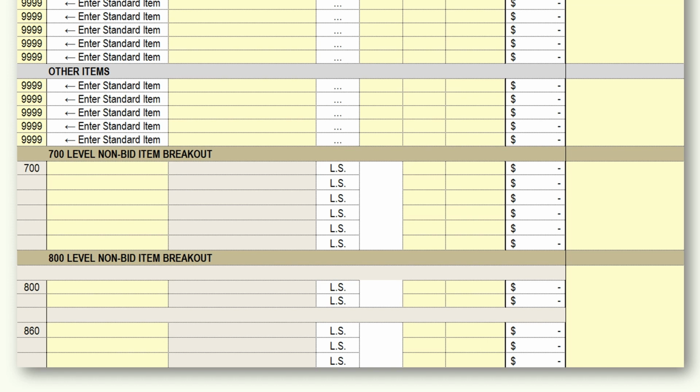You will be accounting for that, and you don't want to be doubling or tripling up on that type of contingency. Do not underassume construction maintenance of traffic items, i.e. traffic control. Be sure to have the assistance of the construction office and/or construction experts in developing this portion of the estimate, as these bid items can consume a large portion of the budget. Also, be sure to account for any utility conflicts and understand who pays for temporary and/or permanent relocations. If WSDOT pays, then include this in your estimate. This goes for private and public utilities.